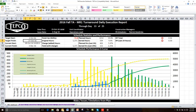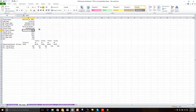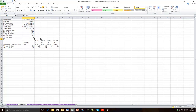These two cells are also referencing the MR1 stat sheet. I've built into the P6 report the project name, the data date, the baseline project start, baseline project finish, current start, current finish, and the baseline duration in hours — because turnarounds are typically scheduled in hours. There's an original baseline hours and a change baseline hours, because we recommend having two baselines: one change baseline set as the project baseline, and one original baseline that never gets changed, set as the user primary baseline. We also have the plan value and earn value — the overall plan value and overall earn value for the project — and the SPI calculation.